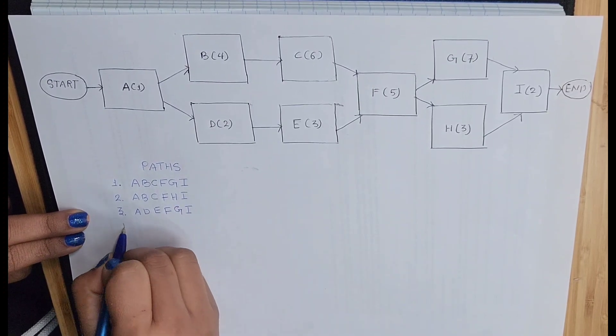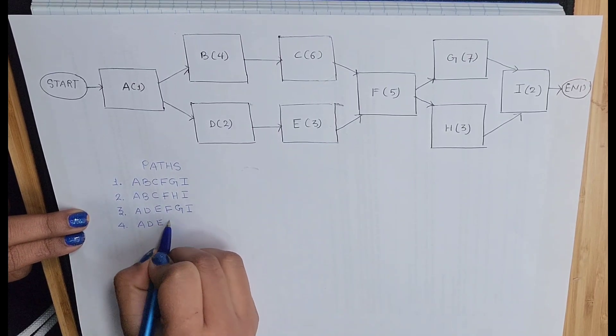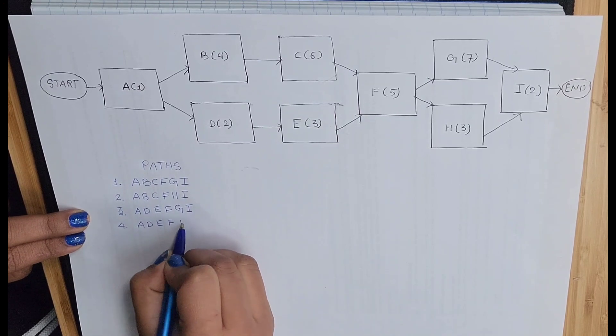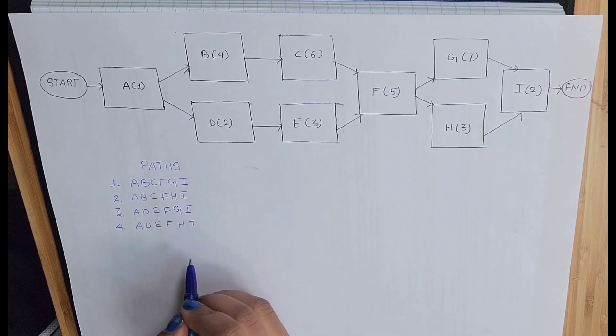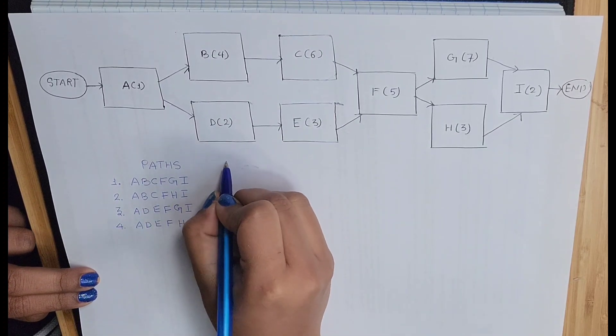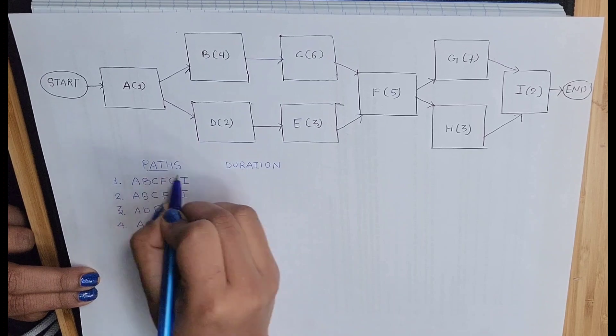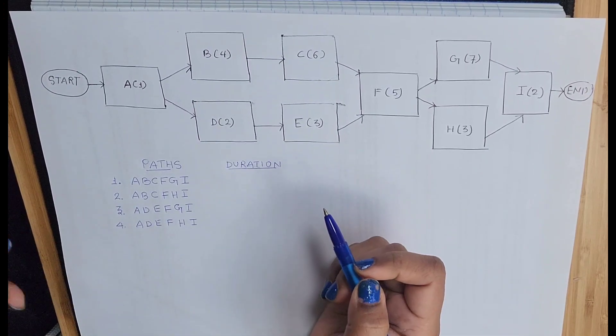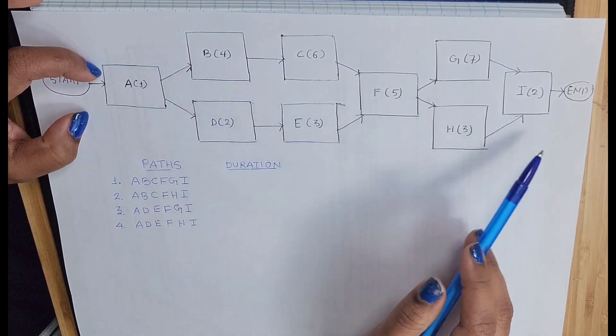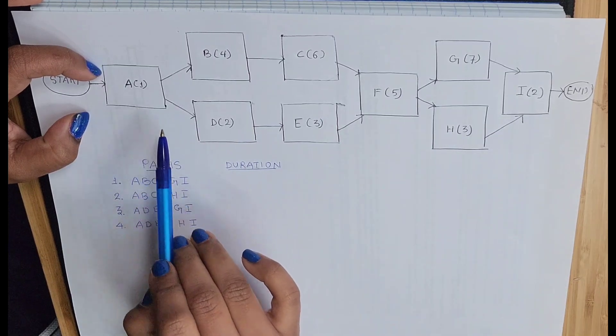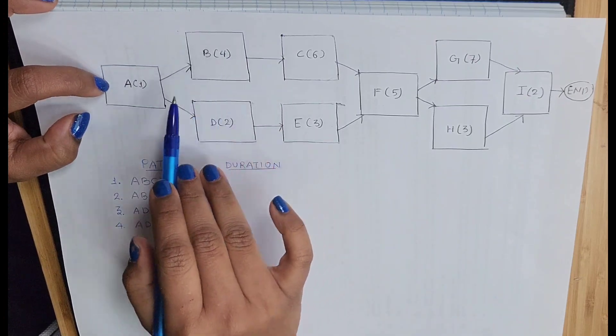Similarly, one more path is possible which is A-D-E-F-H-I. So first you have to write down all the paths. Now we have to calculate the duration of each path. To calculate the duration, you know how many days or hours these activities are going to take to complete. It is mentioned here.